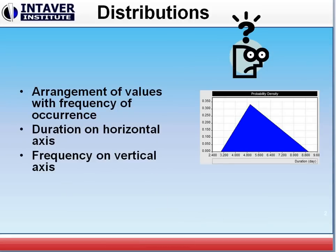Now what are distributions? For the purposes of schedules, they are arrangements of values with the frequency of occurrence. We can see on this example that duration is on the horizontal axis and goes from three to nine days, and the frequency is on the vertical axis. There's almost no chance we'll be at three days or nine days, and the most likely is at five days, about 33 or 34 percent.